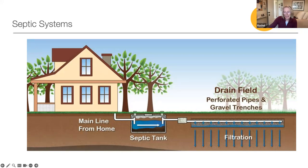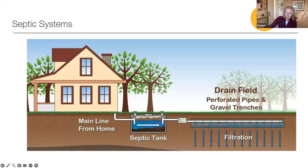We have broken this section into basic steps. Before you can build an ADU, you must find out the capacity of your existing septic system. Hire a county-approved qualified professional. Have the system evaluated. Design and upgrade or replace the system. Apply for an environmental health permit and get approved. And then, and only then, should you begin designing your ADU.